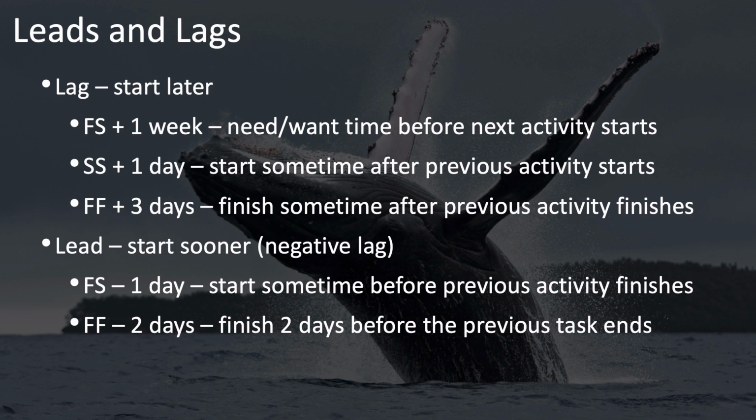Or suppose you have 2 activities that are finish to finish with a 2-day lead. For example, you may have a document that's being written and you want someone to come in and proofread it 2 days before the document is completed. Their ends are related, the finish dates of these activities are connected, but one can and should perhaps finish a couple of days before the previous one finishes.